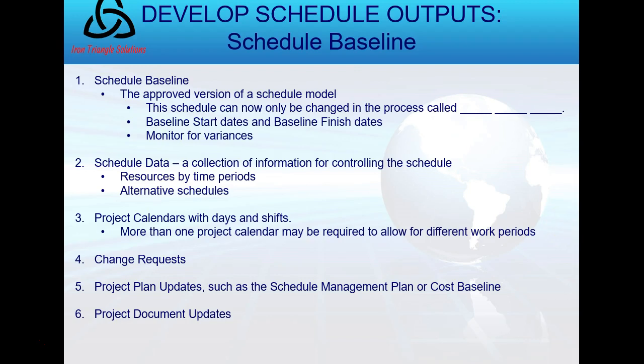So the schedule baseline is an output now of develop schedule. I finally have my schedule baseline. This is the approved version of the schedule model. And the schedule can now only be changed in a process called Integrated Change Control, ICC. Bueller, that's a reference to Ferris Bueller's Day Off. Great movie if you have time.